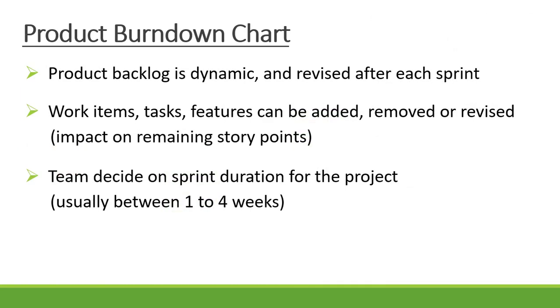Now, the product backlog is dynamic and revised after each sprint. So work items, tasks, and features can be added, removed, or revised, and that will then also have an impact on the remaining story points. Furthermore, the team decides on the sprint duration for the project, and each sprint is usually between 1 and 4 weeks.